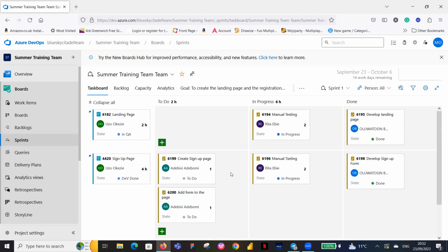Thanks. That's our stand-up done. So for your stand-up, it's just: what did you do yesterday? What are you doing now? And do you have any impediment? And that's what you've just seen us do. Because we're just 3 people running the demo for this stand-up, that's why it's that short. But it's a time-boxed meeting of 15 minutes. So that is the stand-up done.